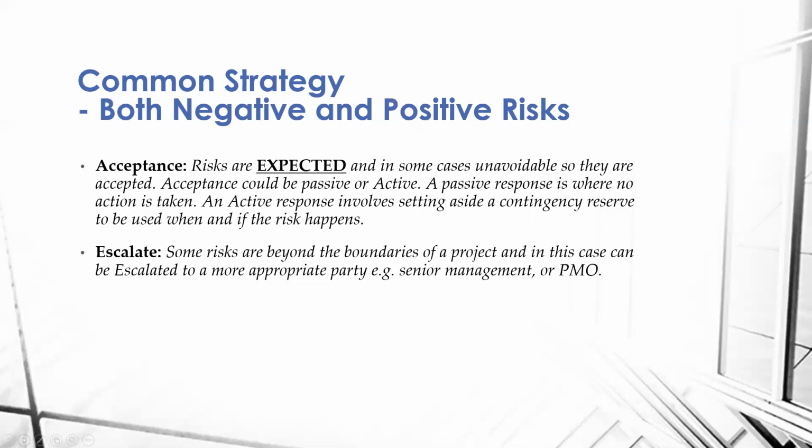Another response strategy that can be applied to both opportunities and threats is escalate. Some risks are beyond the boundaries of a project. In this case, they can be escalated to a more appropriate party, such as senior management or the PMO.